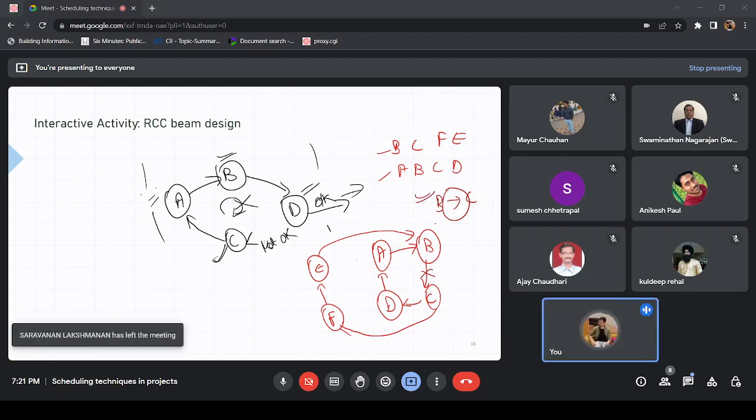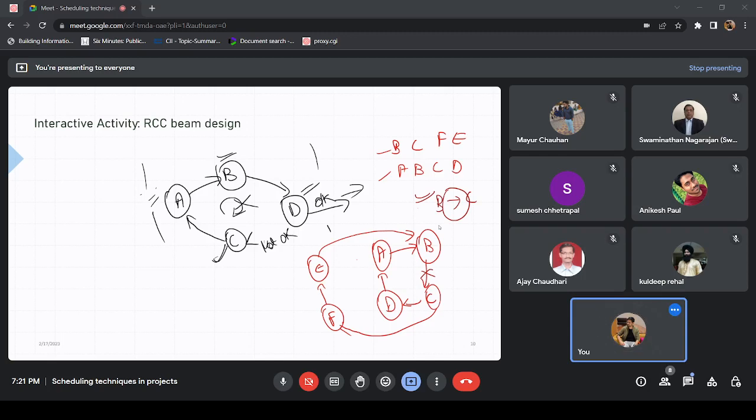You find out the common point in the cycles, or common points, and try to remove them. I hope you got an idea.